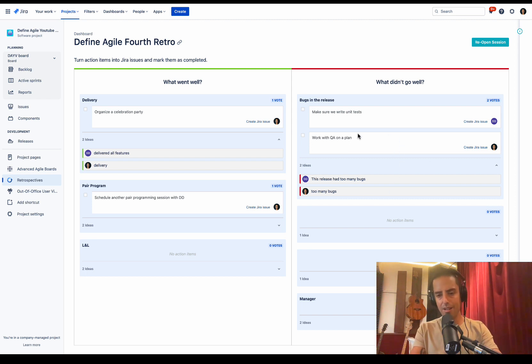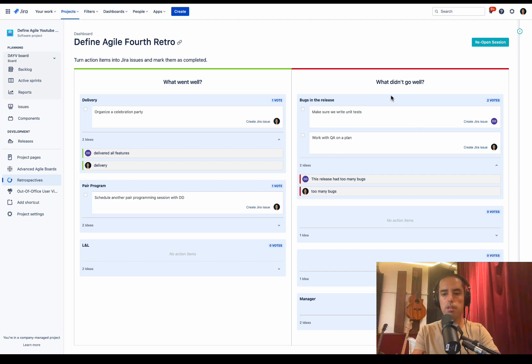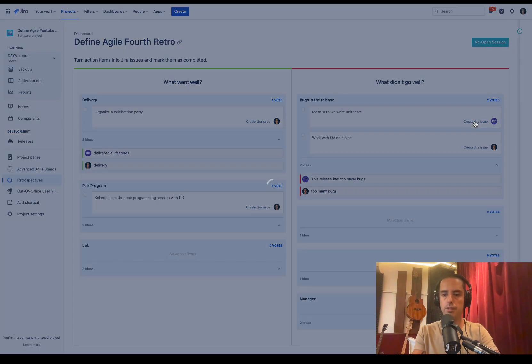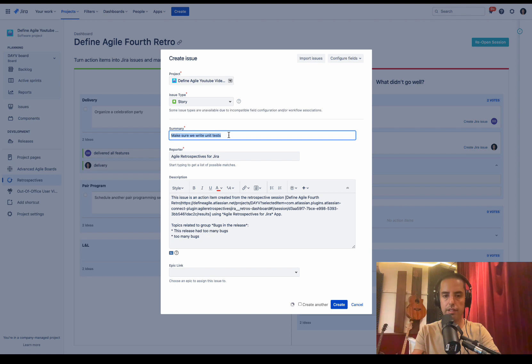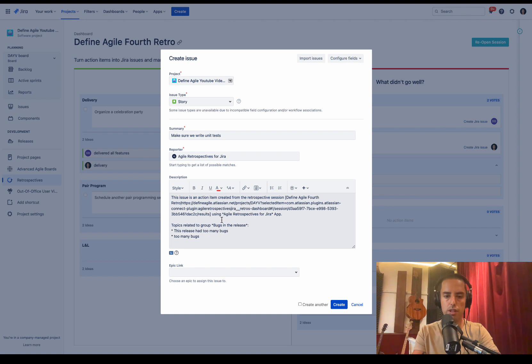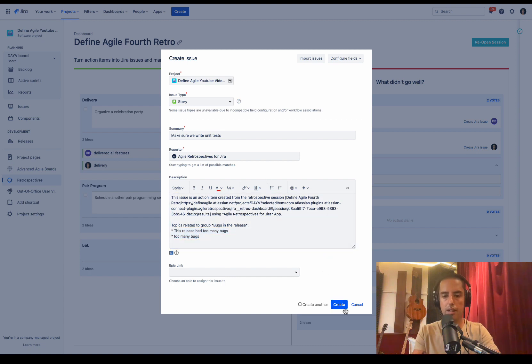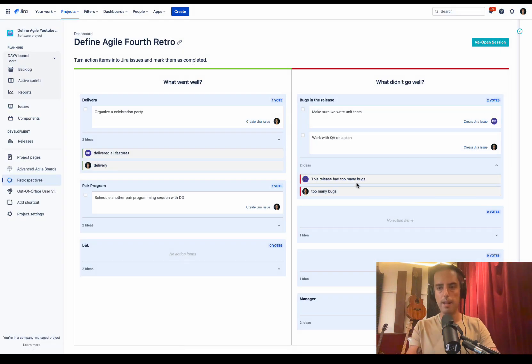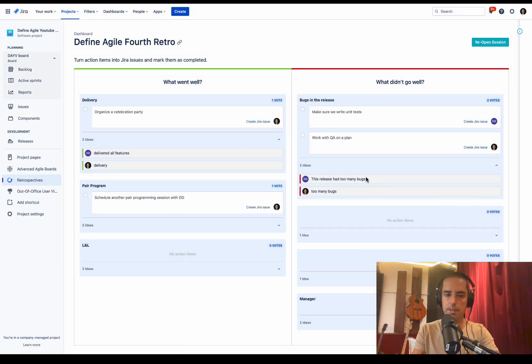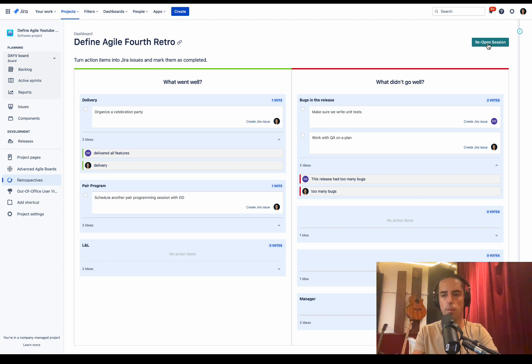And the other really cool feature that I like that saves you lots of time is that you can create Jira issue right from here. So let's say we agree they want to put this into a sprint, so we click create an issue. It will pre-fill everything. Summary is here. Reporter is here, which is we know that it came from retrospective for Jira. All the information is here. What are topics discussed? Link to retrospective. Everything is here. So we can just click create and it will be created. And we can do it for all the issues. Then we can go back here and do it as many times as we want. And then if we want to reopen it, let's say, okay, let's continue this in two days and tackle more issues. We can reopen the session and go through it again.